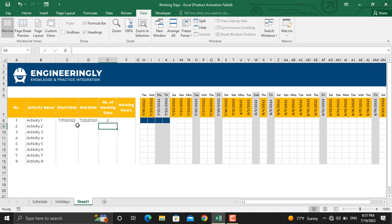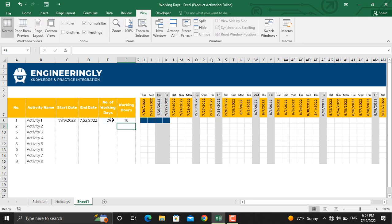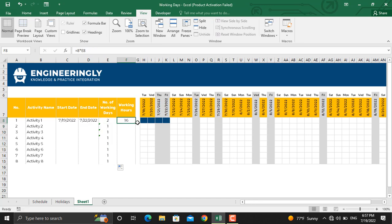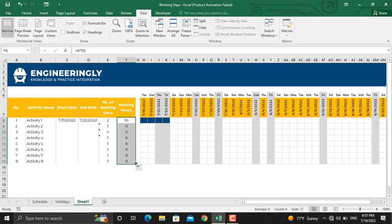For the working hours, since we have eight hours on each working day, so I'll write down eight times this cell. So the total working hours available for this activity is sixteen working hours. I'll drag this formula up to the last activity, and drag this formula up to the last activity as well.